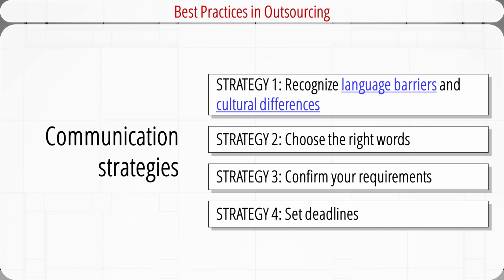It's a good practice to document your requirements. Follow up your conversations in writing. People understand written language better than spoken language. You can confirm your requirements by requesting a prototype to ensure that your needs are positively understood. Set deadlines and checkpoints to monitor the project progress. Also, emphasize the importance of meeting deadlines.